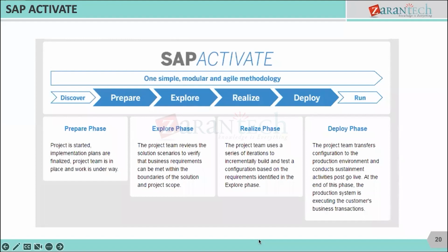But in that we have a potential risk. If you consume almost 70-80% of the timeline and then come to the client to showcase something, and if some fundamental approach itself is wrong, with feedback like this is not my expectation, then the entire project timeline goes for a toss.